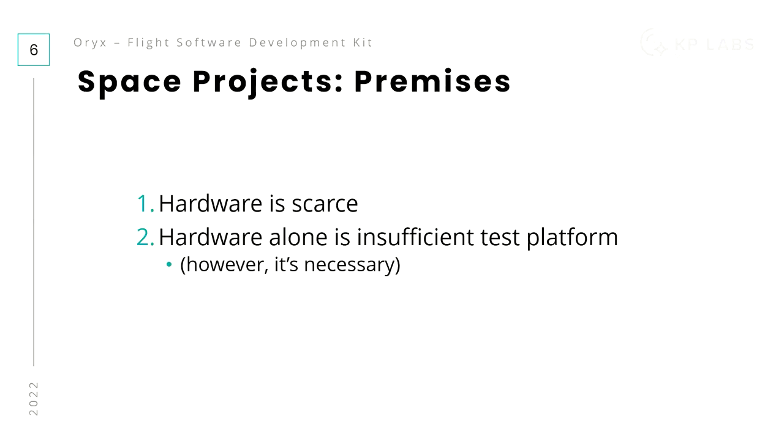Another thing is that the lead times for hardware, space or not space, are very long, even without the supply chain problems. If you, for example, have radio equipment, it takes a long time to order it, because you probably have to go through all the legislation related to radio frequency allocation. So you have to actually create that and be sure what radio you have to order,